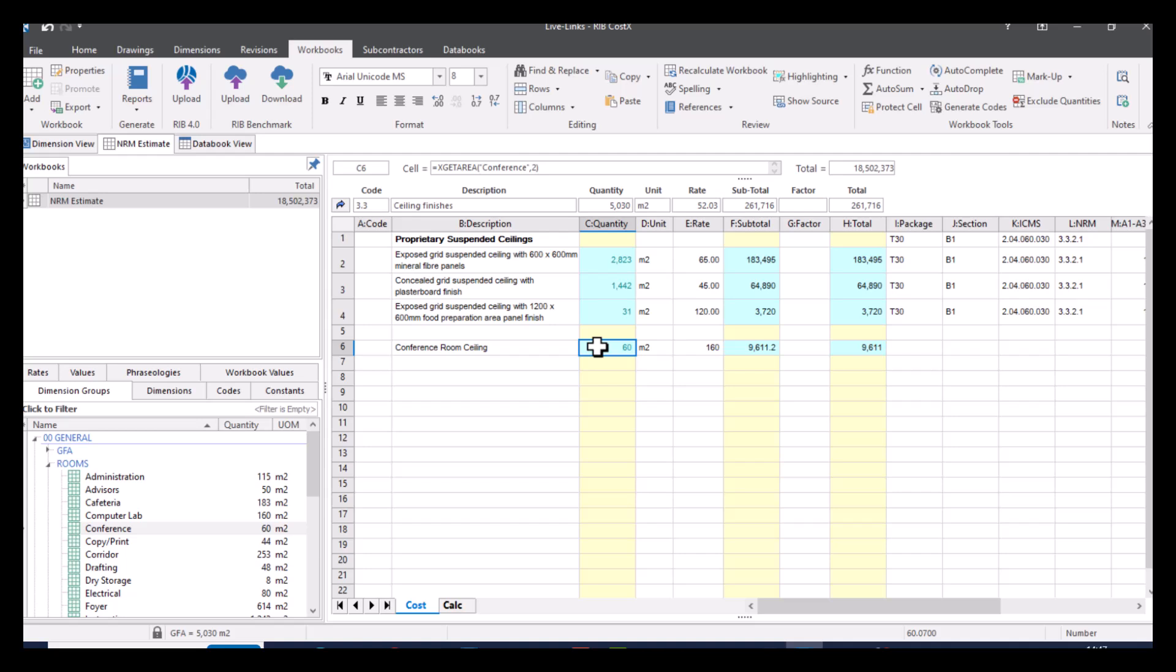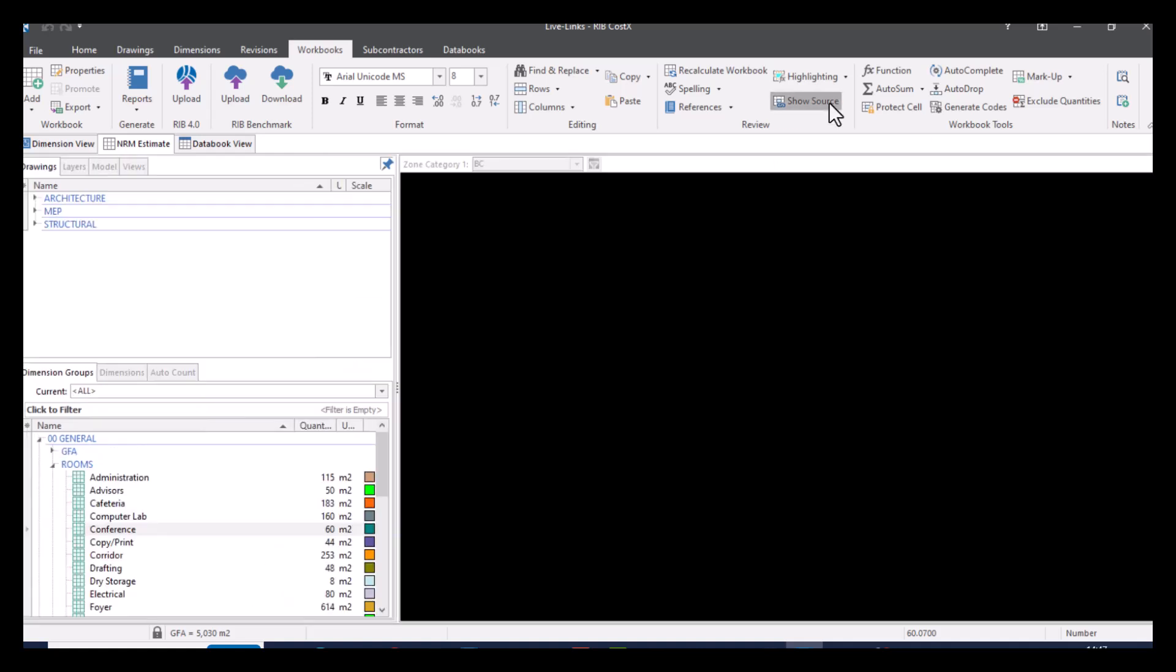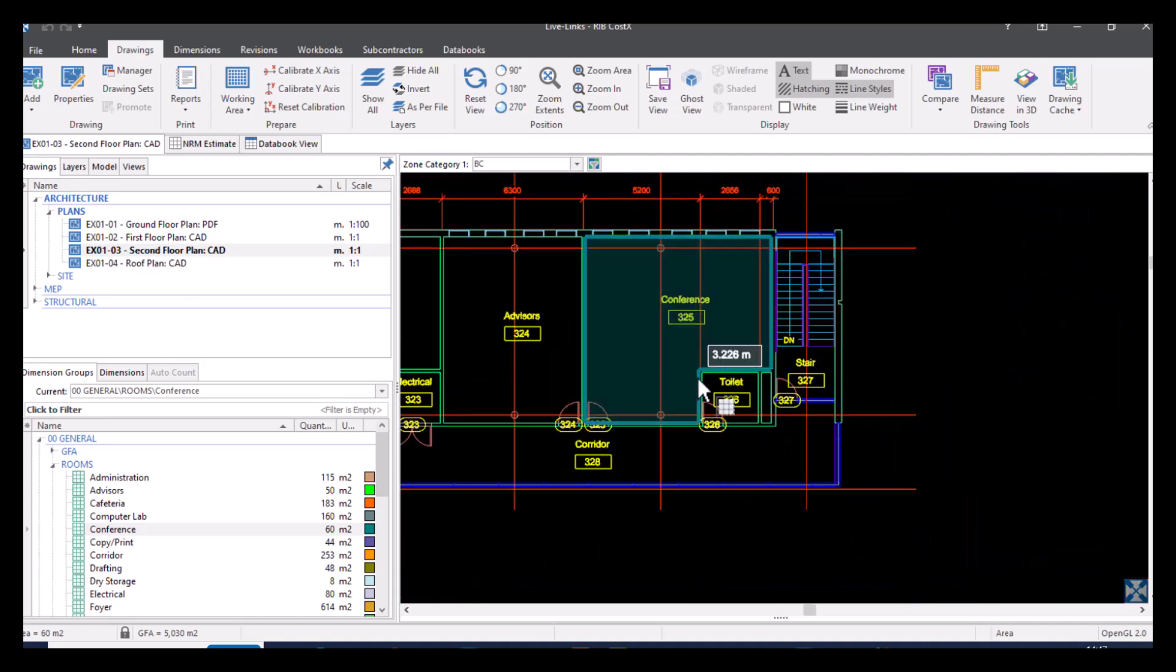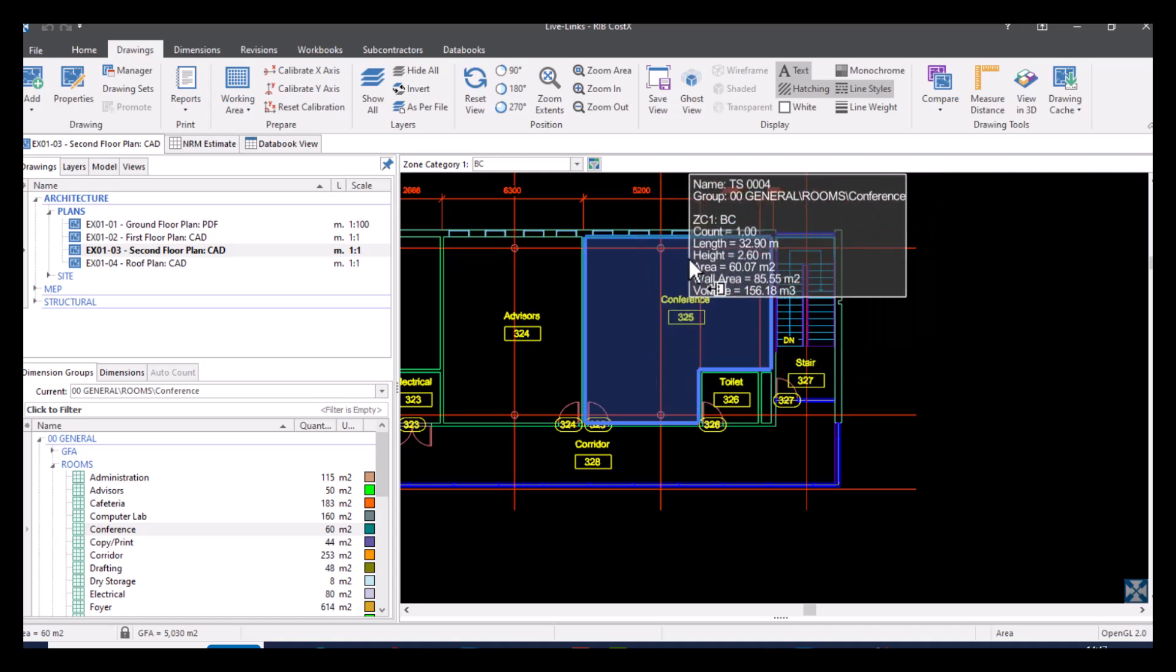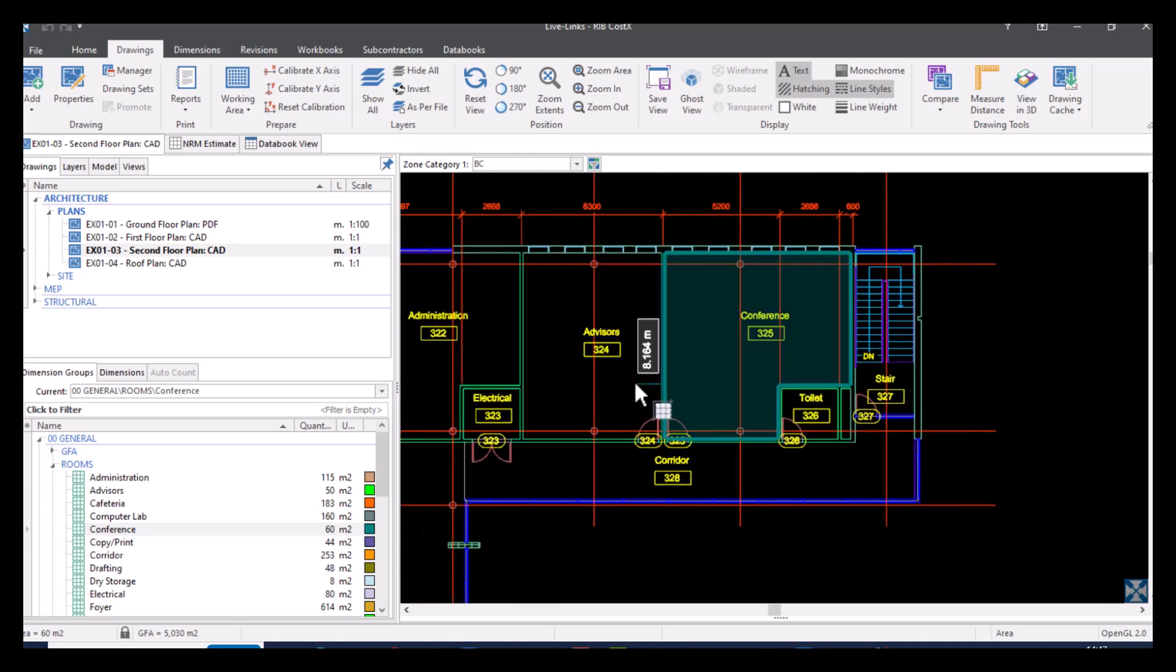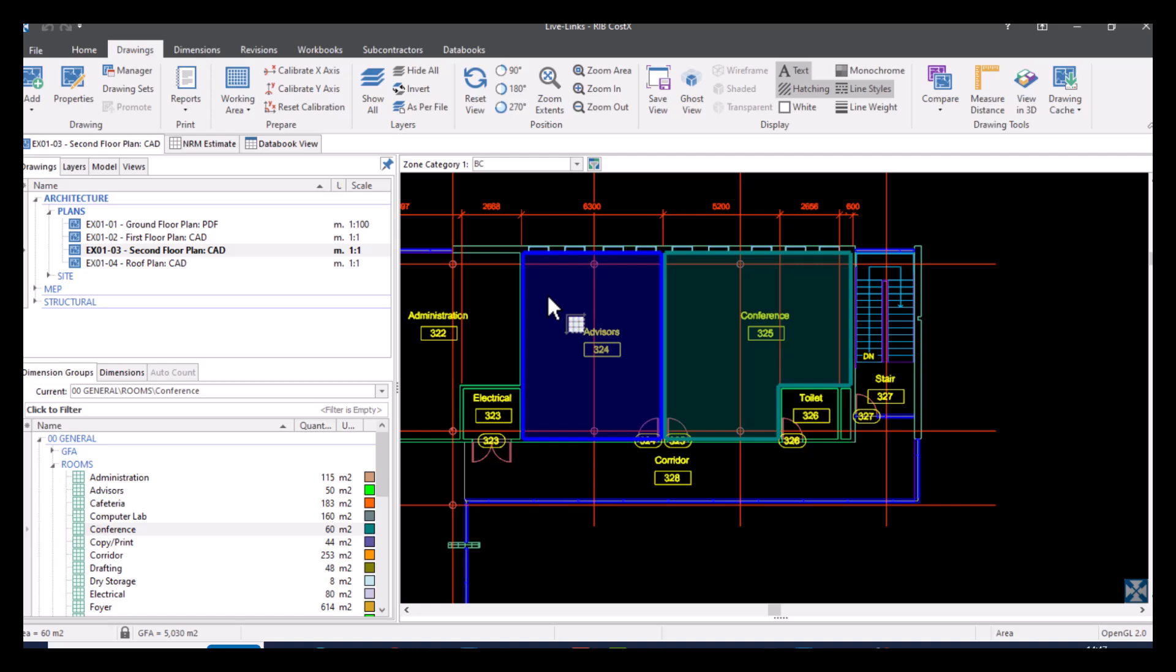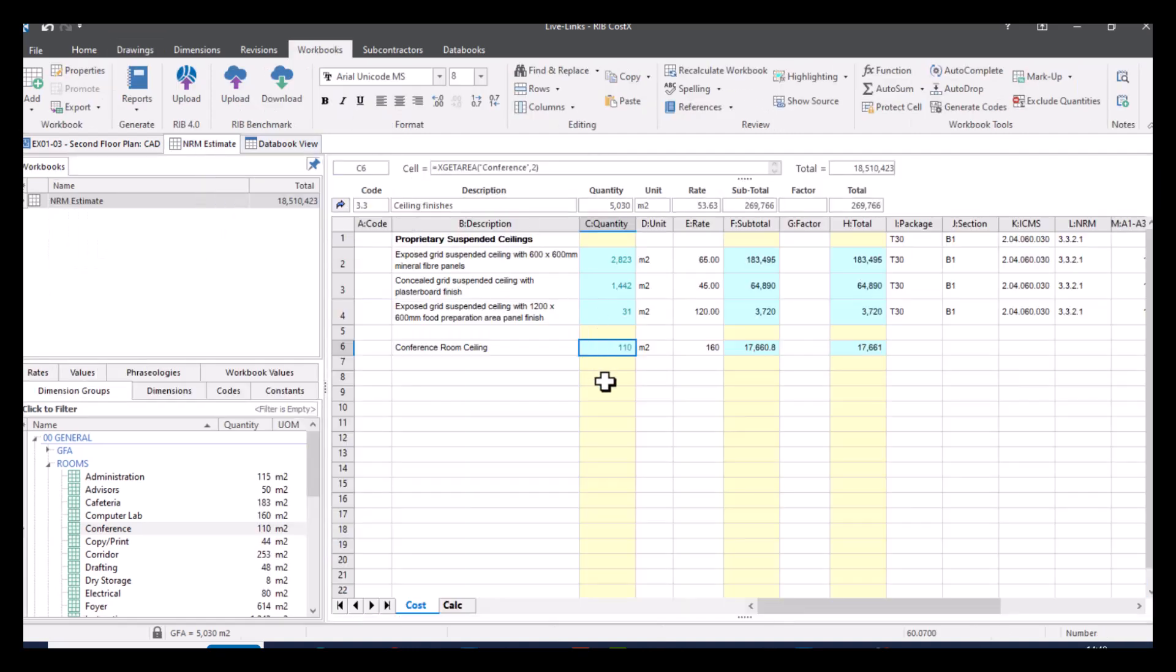So let's demonstrate the benefit of this. I've got a button up here saying show source. So I've got my 60 metres squared selected there. I'm going to click on show source. And what this is going to do is take me to the drawing that it relates to, showing me exactly where that quantity is coming from. So we've gone to our second floor plan CAD drawing and we can see here that the 60 metres squared is actually coming from this conference room here. Now, if we were to alter this in any way, for example, let's just say we want to add in this advisor's room as well. What we can do is just select that, so it's in the same dimension group. So obviously the amount has changed to 110 metres squared now.